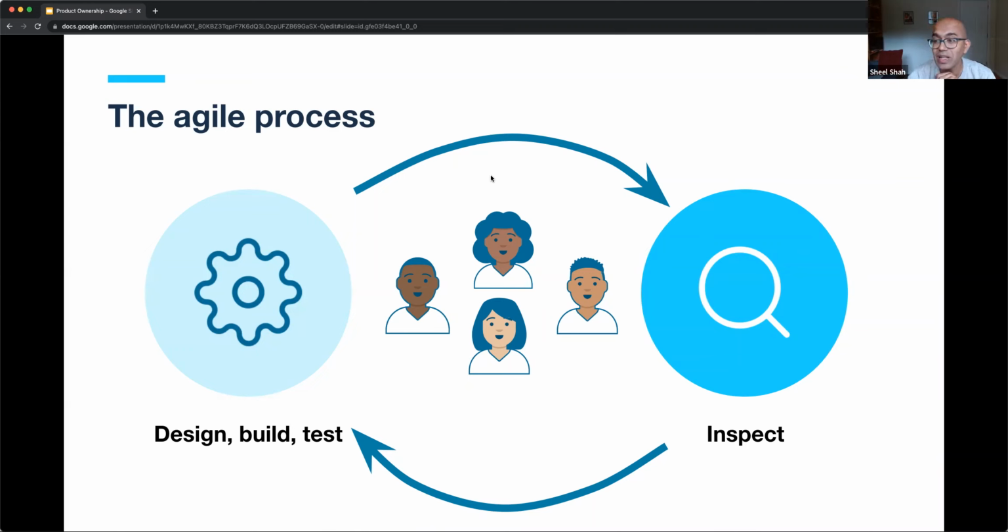I did that style of development in my first product management job. When I was working at Microsoft, we were building this software product for desktop computers. And we had a plan to do this over 3 to 4 years. By about the third year, most people were moving a lot of their software off of desktops onto the web. And so by the time we actually built and released the thing that we had planned to in 4 years, everyone had moved off of desktop software and was using the web. And so what we built really wasn't applicable anymore. And that's a very common thing that you'll see with waterfall development.